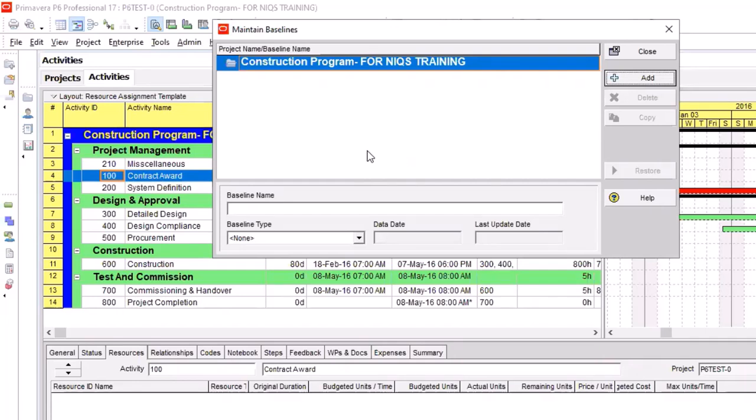Maybe I've done this job last year. Let me say I did the Train 6 turnaround in 2020, and I'm doing the same project in 2024, right? I'm doing a turnaround on that plant in 2024. So now I want to compare the schedule I've developed for 2024 with what I used in 2020. Remember, the plants did not change. It's the same equipment I worked on. So let me see my data, whether it's changed. Did I actually implement my lessons learned or not?